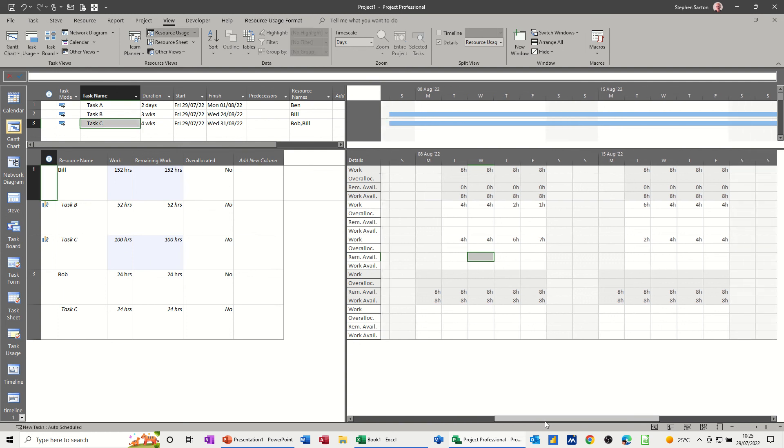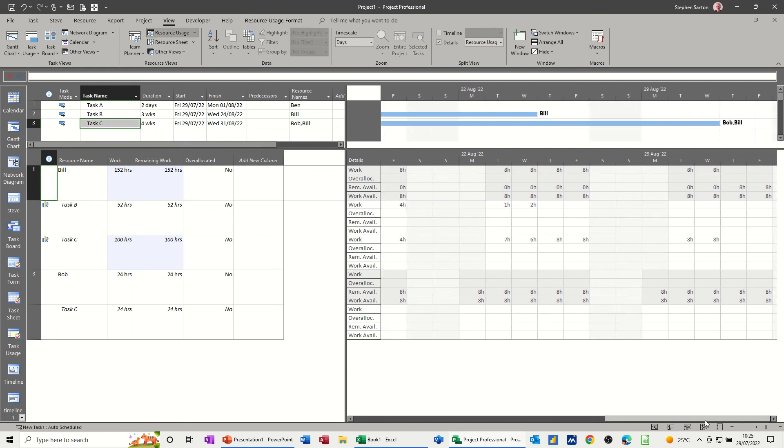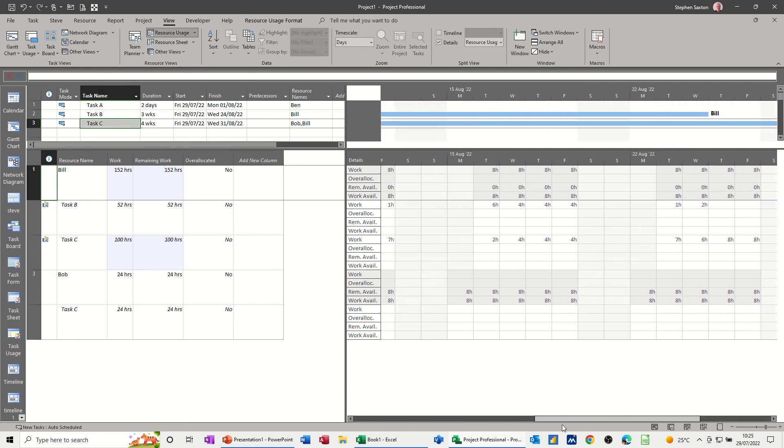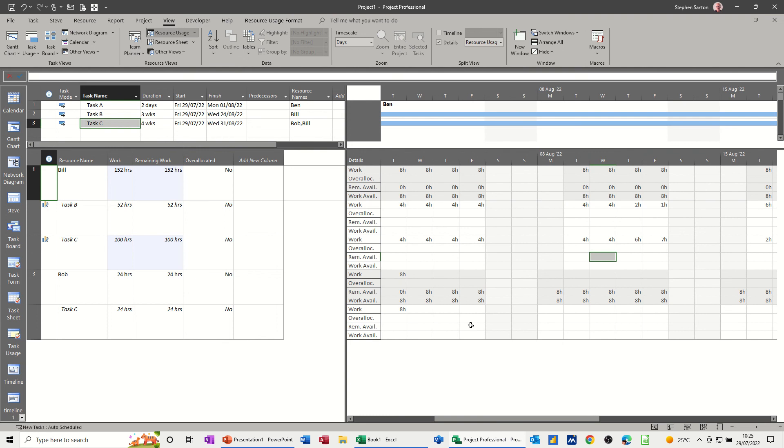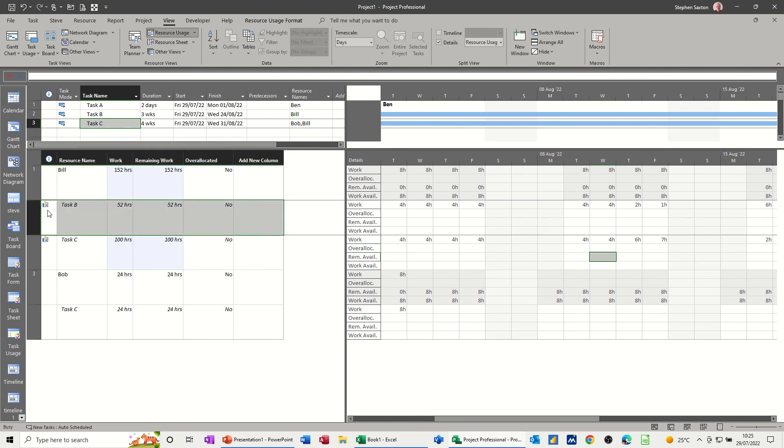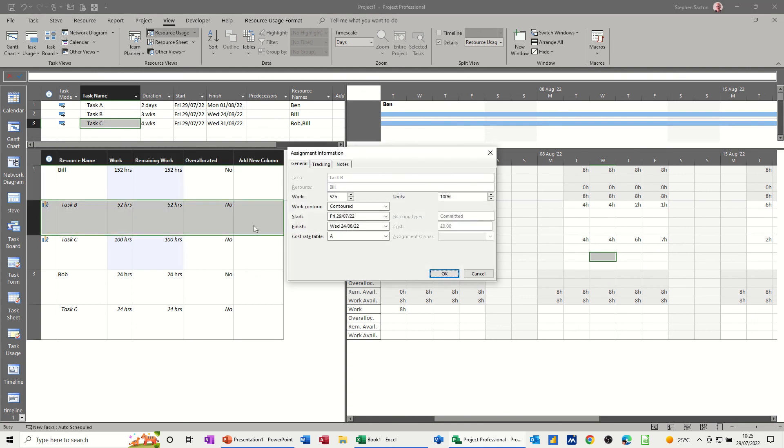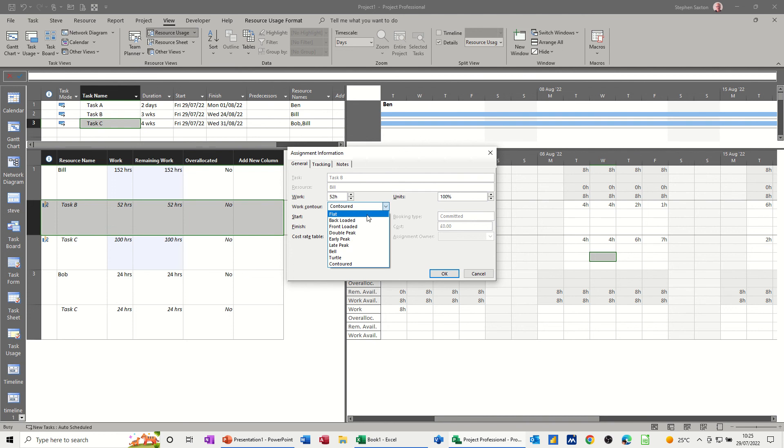Now, because I've physically typed in the hours that this guy's going to do on this task, what you've got in this indicator column is a little graph, which means it's been the work contour. If I double-click into it, the work contour has been modified. You've got lots of different work contours in there. So you've got flat one, which is the default.